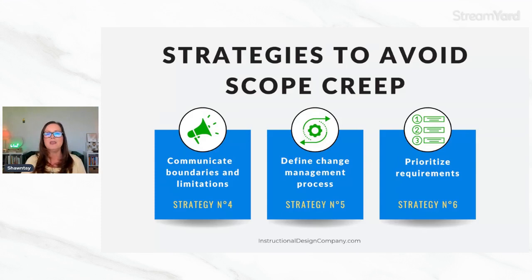So we just have to be in communication about what the limitations are and what the boundaries are. And then it's also helpful if there's an actual change management process. So if somebody comes and says, hey, can we add this video? Well, maybe our process is, well, let's have a quick huddle about that. Let's get clear on what the expectations of that video are, what that is, how long it is, what resources are available, who's going to build it. So you just get really clear on the requirements so that you can then go, oh, well, it might have only been a 1 to 2 minute video, but based on what you're telling me, that's really going to take about 8 to 10 hours to build, which means, X, Y, Z.